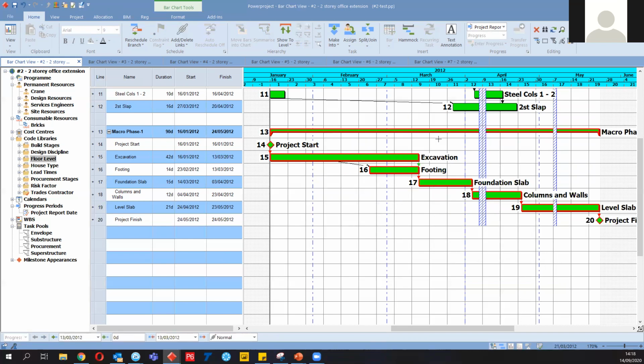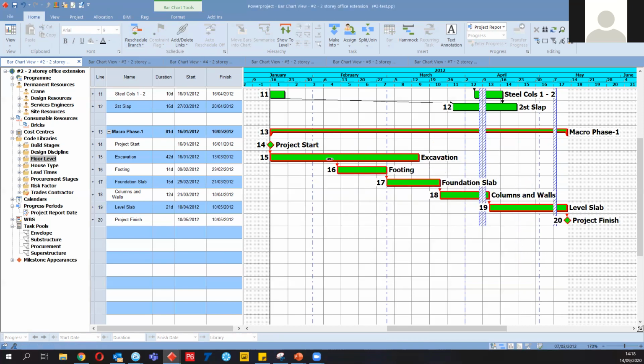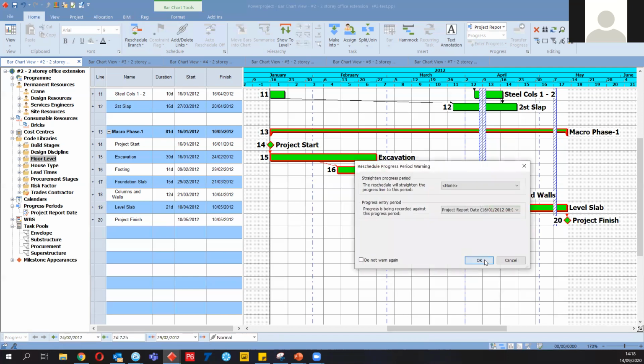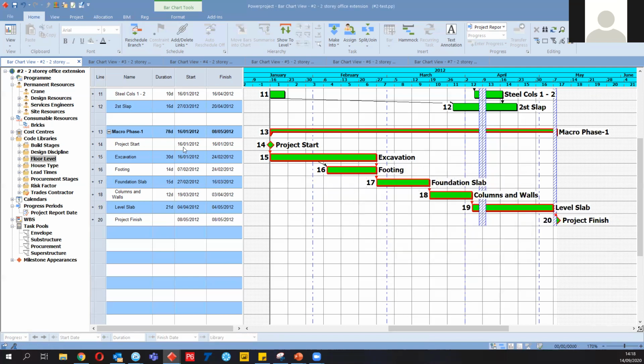Of course, we have finish to finish 2, so that's why we cannot see. Okay, so this time you see that 45% is finished, then footing can start. We can put these types of lag types in our project too. Let's create a float here. Click OK. Okay, so this can be our project.